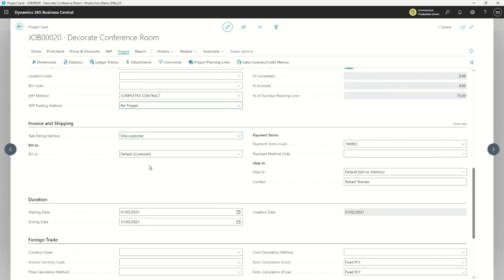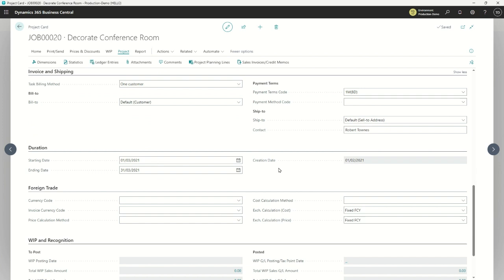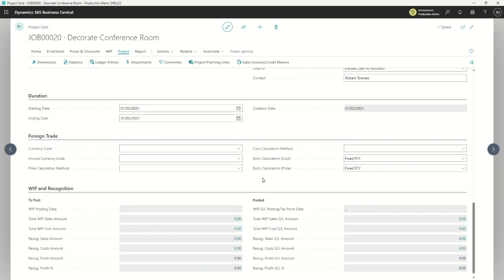Scrolling down further, we can do some advanced things with projects. Are we billing a single customer, or are we going to bill multiple customers? Maybe a head office needs to repaint 10 of their stores across the country — we're going to invoice each store individually, but it's one project. We can invoice multiple customers or just one customer. We can have a separate deliver-to and bill-to customer, just like elsewhere in Business Central, plus payment terms, et cetera.